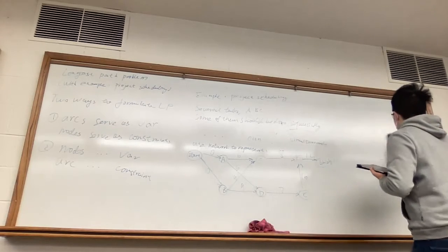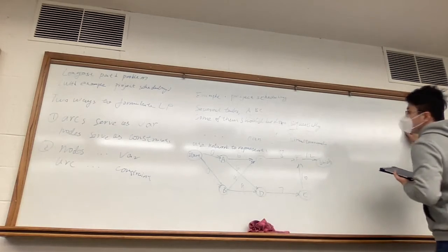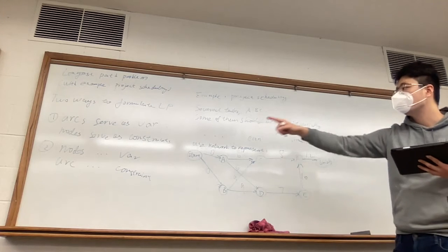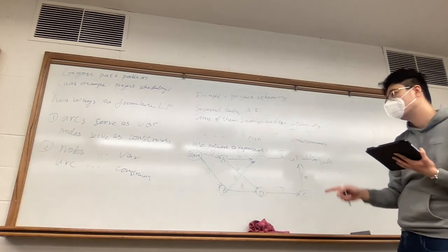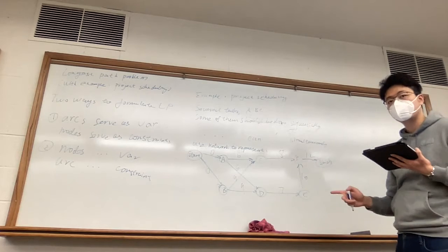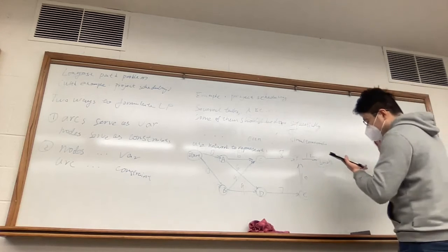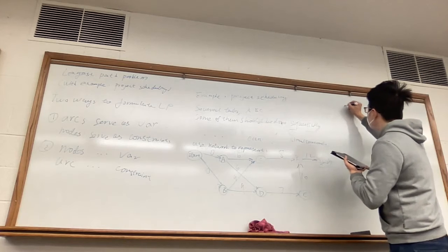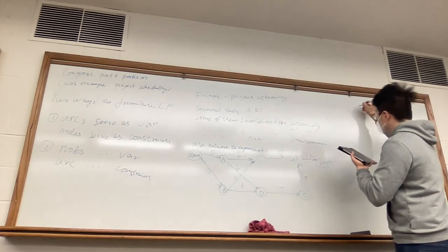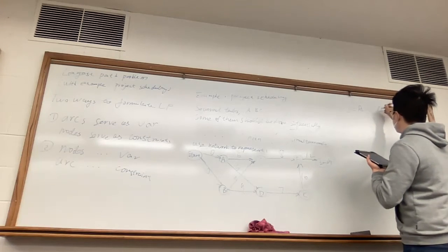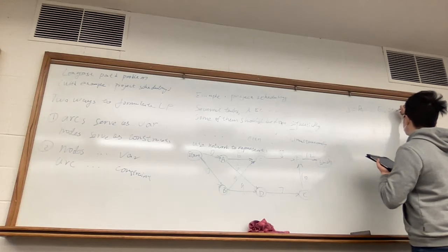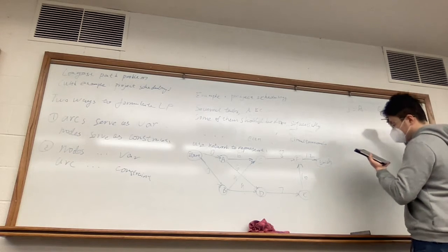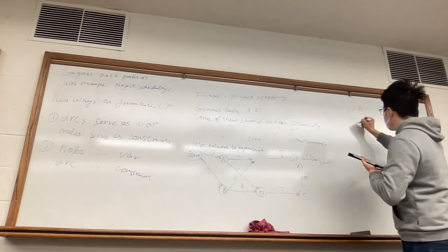Okay, so now let's try to formulate this linear program using the second idea. We set the node as the variable and the arc as the constraint. Let me write: for any node J from A to E, and also start and finish, we set a variable Tj.